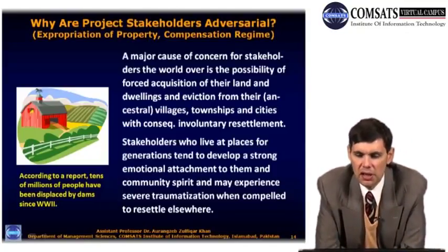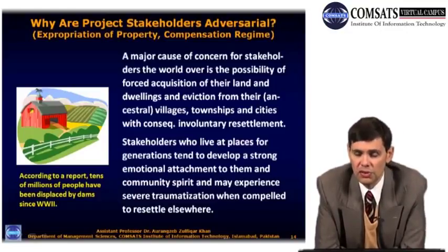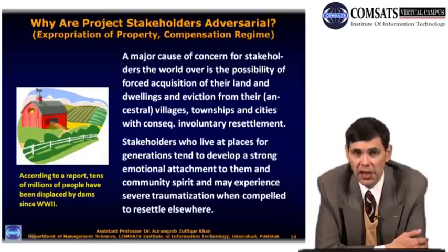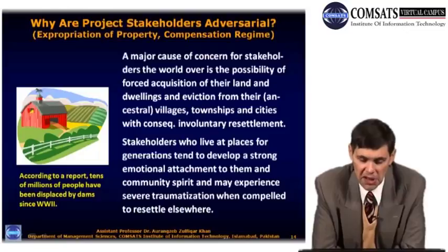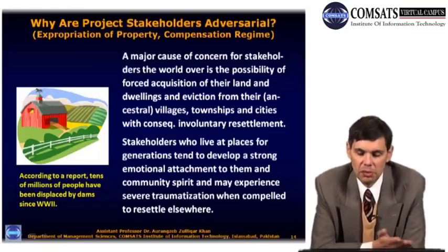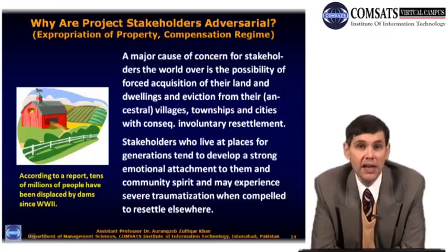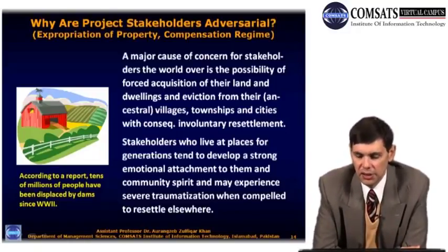Forced acquisition of property, payment of inadequate compensation, resettlement in an undesired location, all these are very strong concerns which stakeholders have on certain categories of projects such as dam building, to some extent airport building, highway building or gas pipeline building, those projects which require a lot of physical space, a lot of land in order to be completed. Of course, there are also big projects which do not require such things. If you are doing a big event project, or some big IT project maybe, then forced eviction, etc., may not apply.